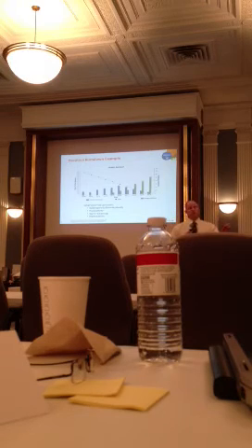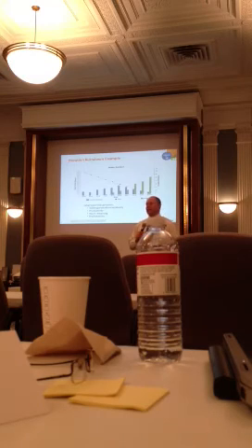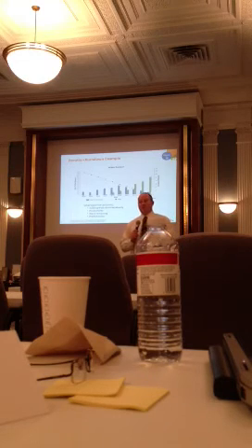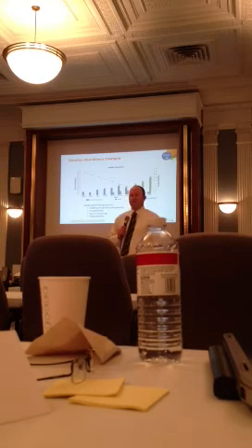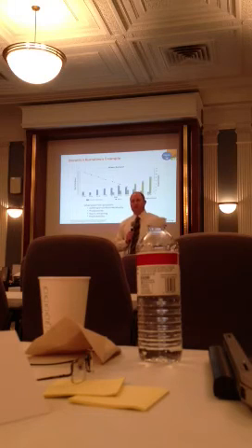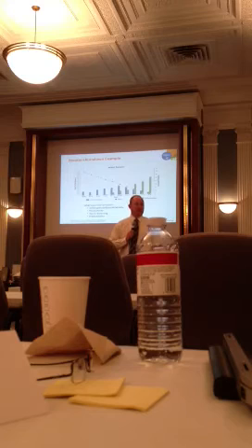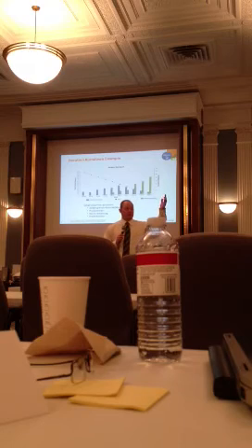The difficulty here, and what we're used to, is let's be safe, right? Oh, we delivered 50 last iteration, and we have some carryover, so I'm only going to let my team commit to 40. That way I can make sure that we get acceptance on all 40. The goal of a Scrum Master is not to play it safe. The goal is to get it right, to commit to the right number. It's just as bad to be way low as it is to be way high.